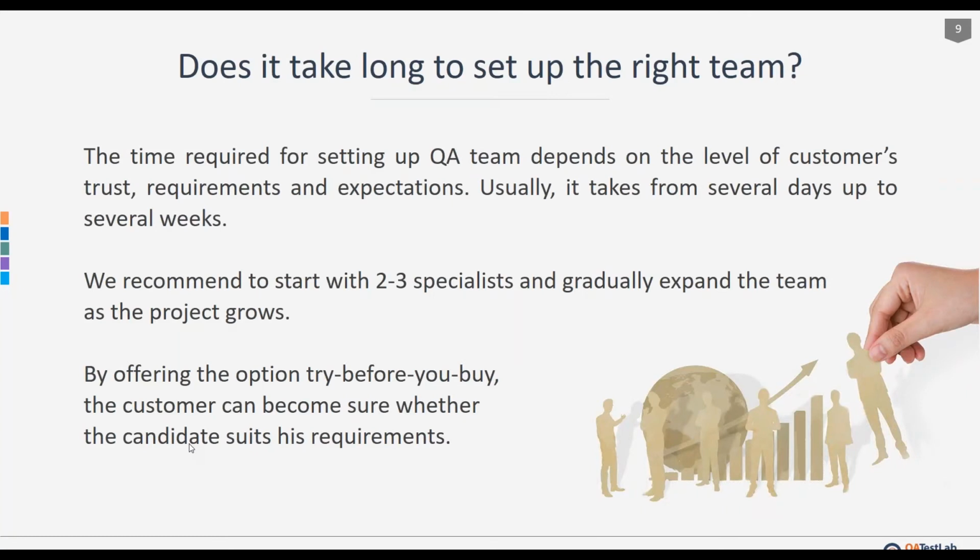You may have a question. Does it take long to set up the right team? I would say that the time required for setting up a team depends on the level of customers' trust, requirements, and expectations. Usually, it takes from several days up to several weeks. We recommend starting with 2-3 specialists and gradually expanding the team as the project grows. This appears to be much more effective than setting up a team of 10 specialists from the beginning.